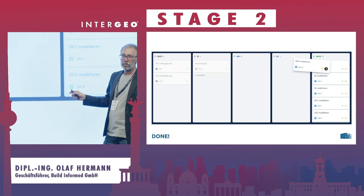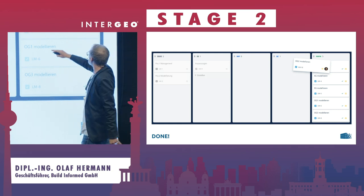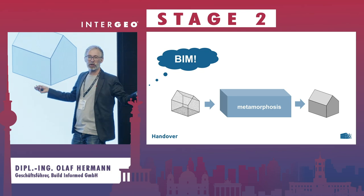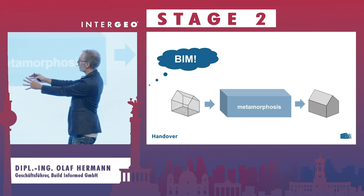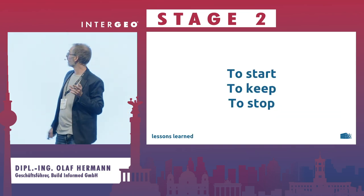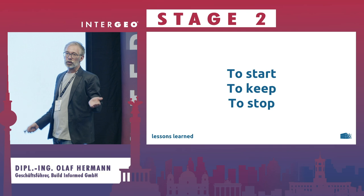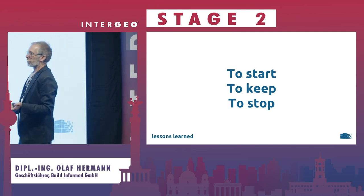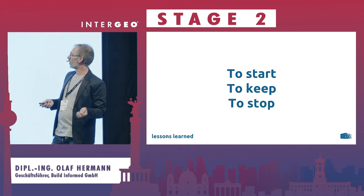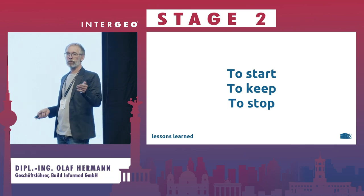The model is done. We checked it, BIM Accuracy confirmed it's accurate. It's going to done — and that's the end effect of the metamorphosis: from a point cloud we get a model. For the client it's over; for us, not. Because always after a project we make lessons learned: what to start, what to keep, what to stop. In every project you develop some scripts, new ideas, new workflows. And one or two weeks after finishing, we make these lessons learned.